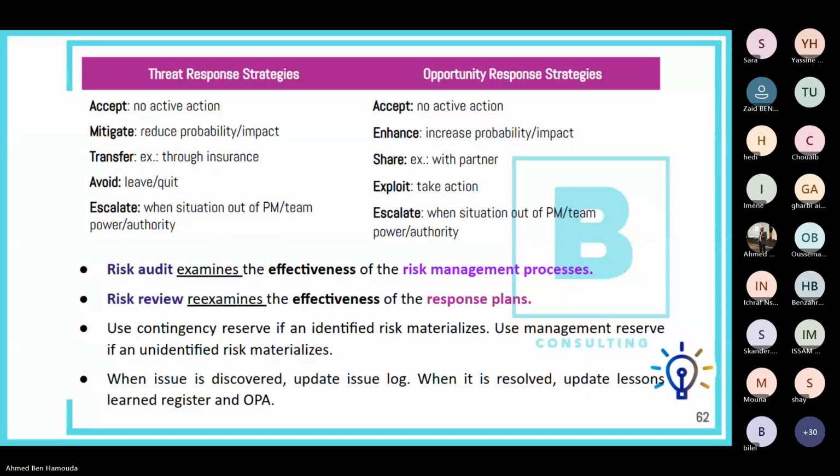Next slide, we will see how to respond to identified risks. Now, in case of a threat, you can pick one of those possible response strategies. Either you accept that the threat exists, so we're not taking any active action, you just monitor the risk. Or you choose to mitigate, that's taking action to reduce either the probability or the potential impact.